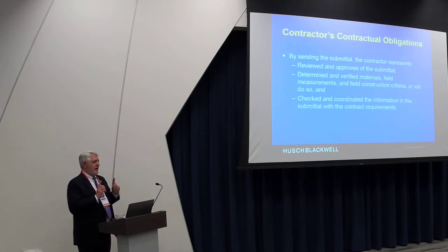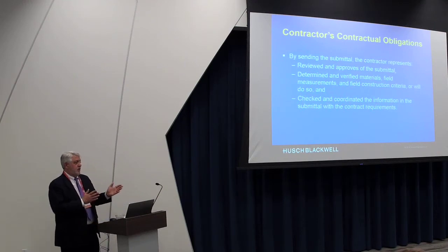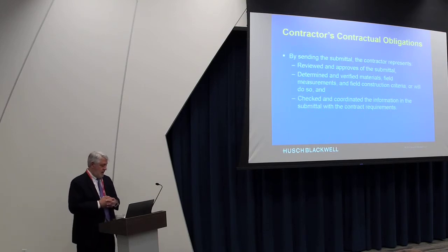Let me take a step back. If your client's contract with a contractor requires, like the AIA does, that he review and approve them before he submits them to you, and he doesn't, send them back. Because otherwise, if you accept it, are you waiving the requirements of the contract on behalf of your client? And if you get into a gray area, there's no reason to get into the gray area. But architects don't approve the contract.